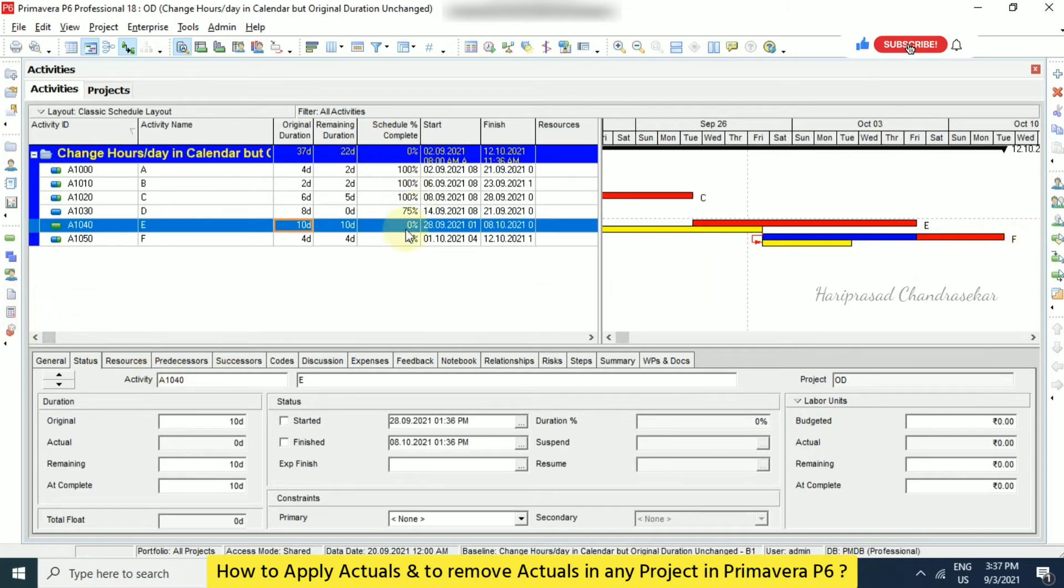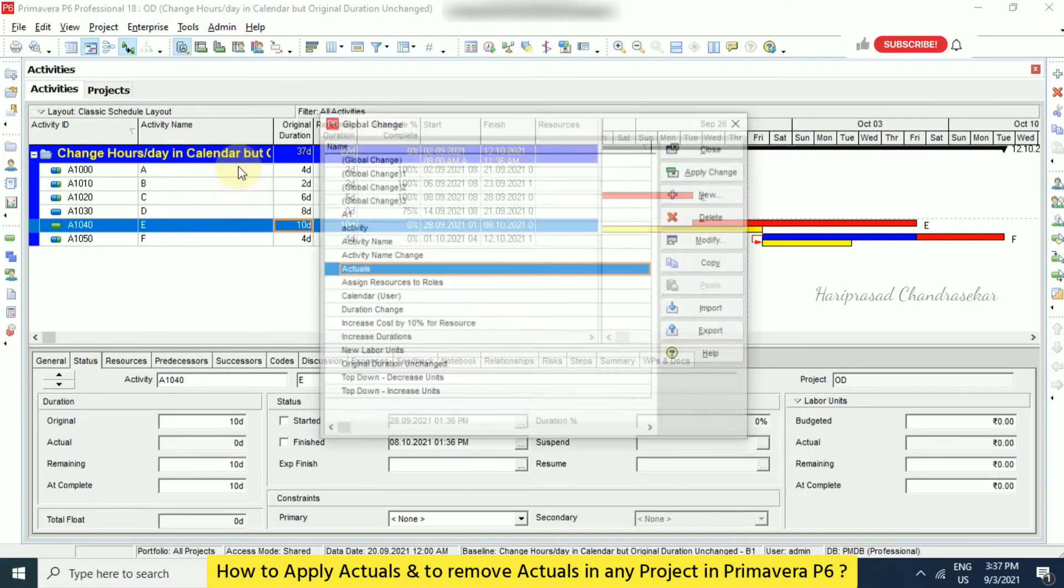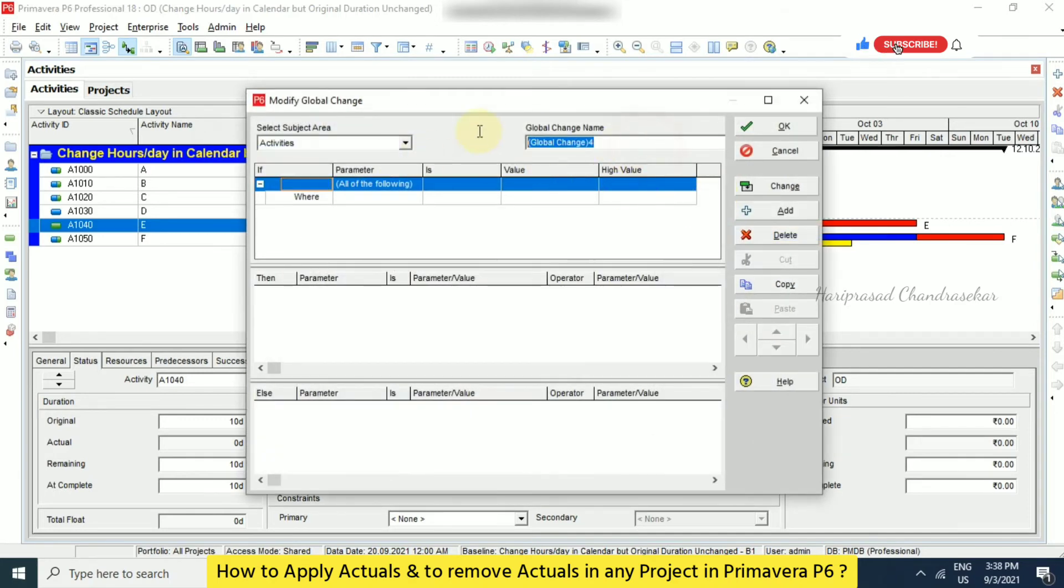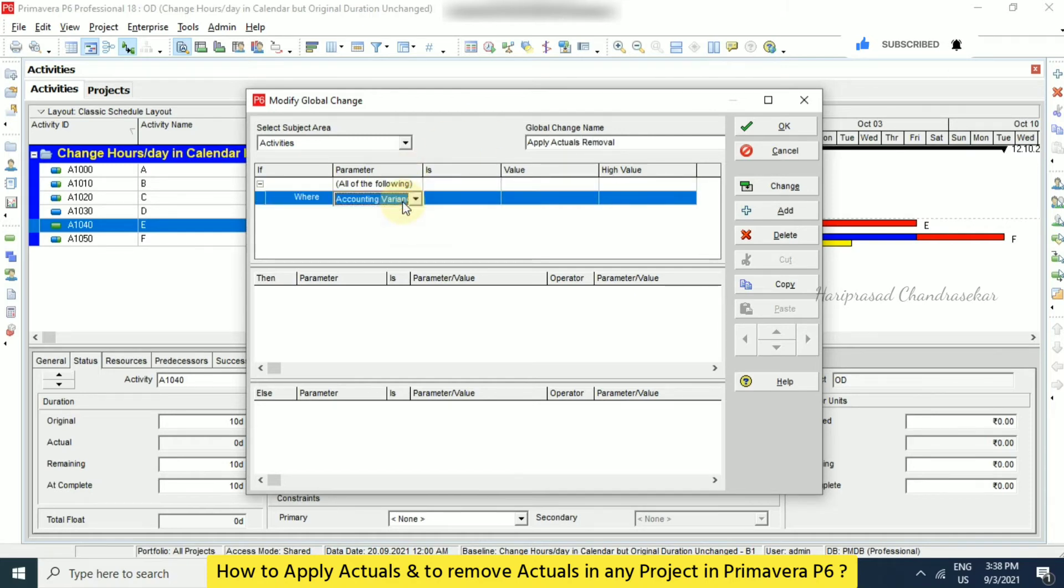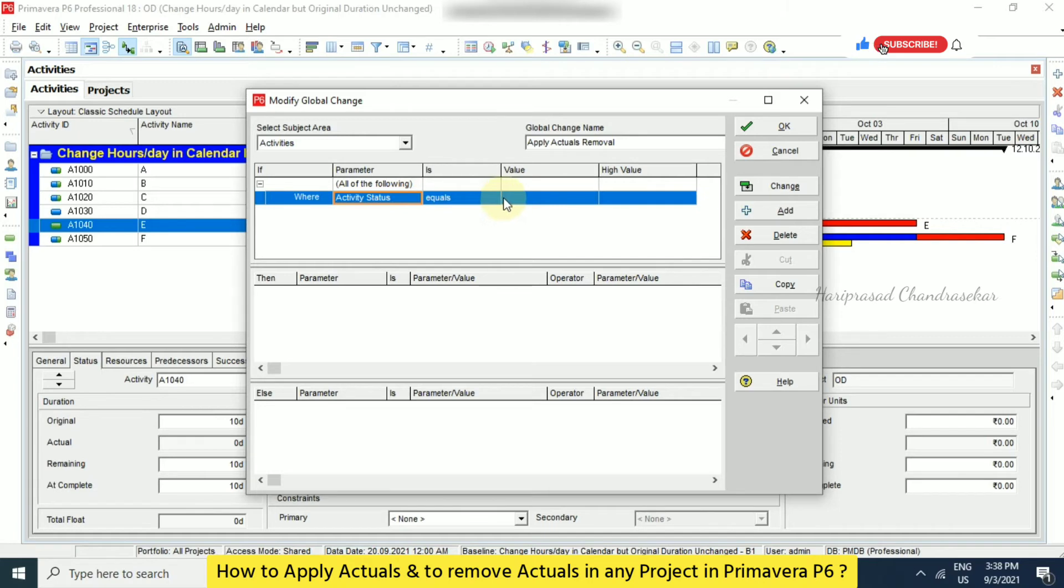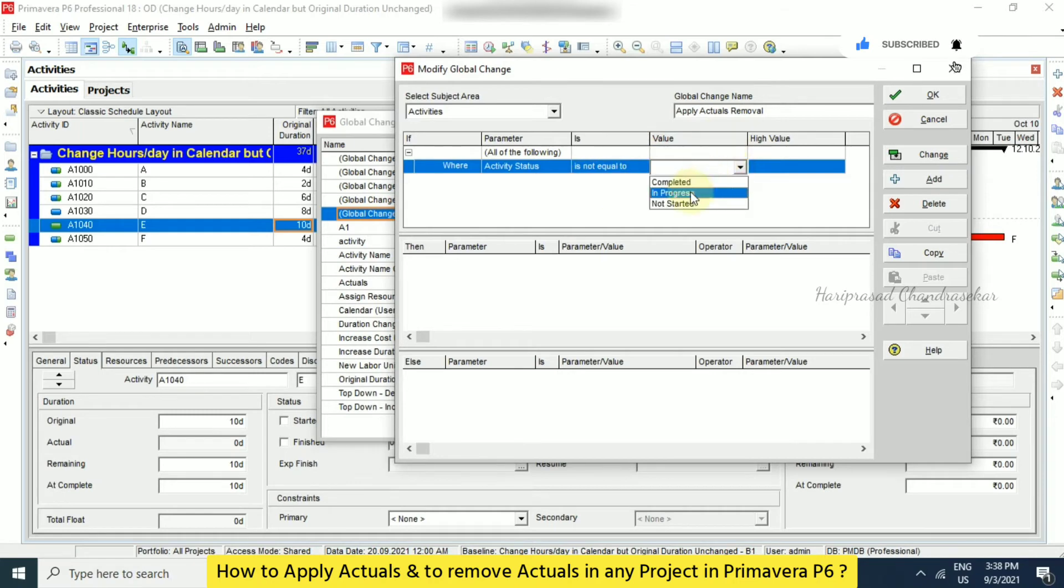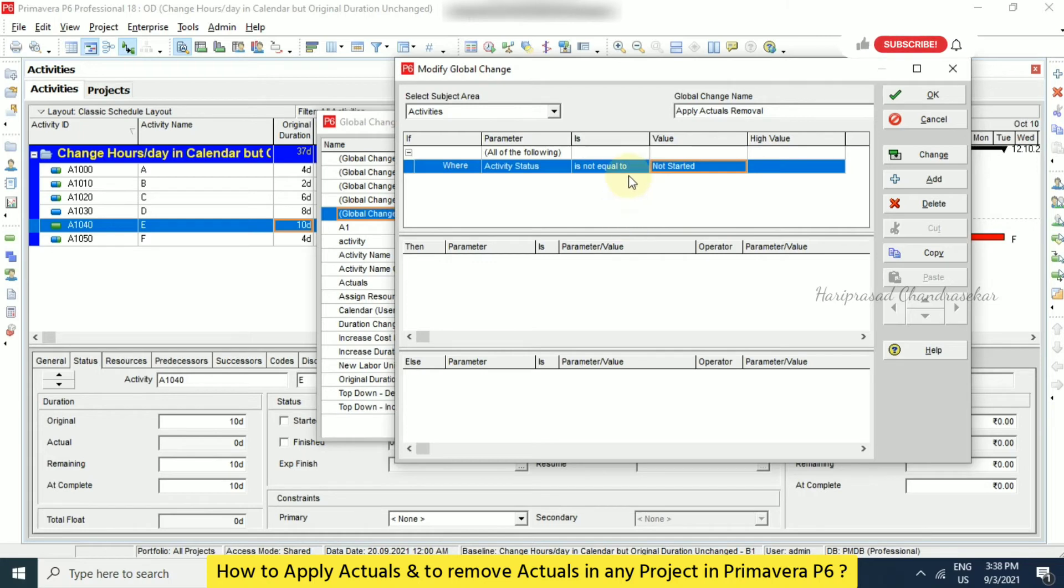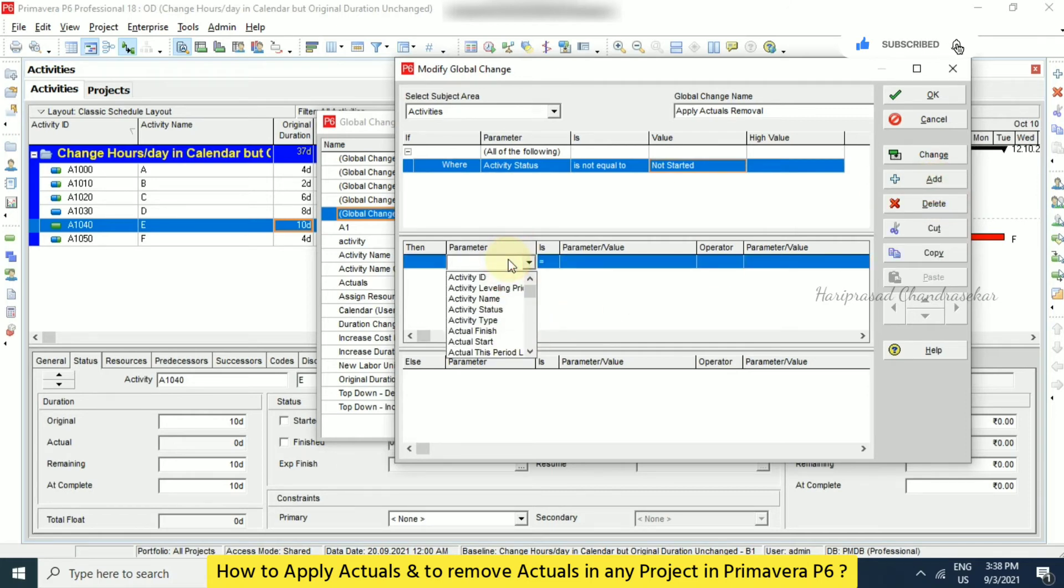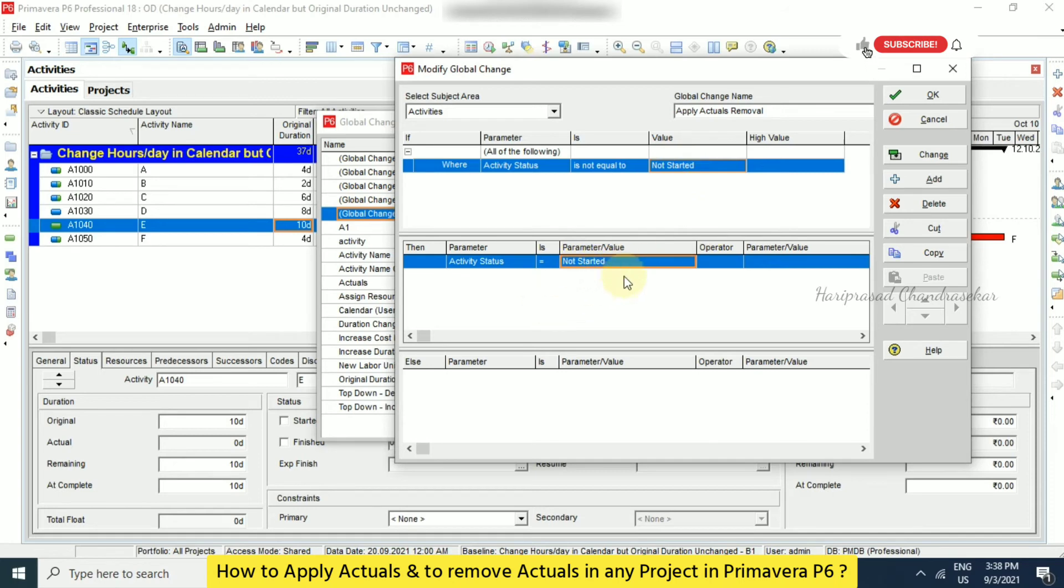In later, if you want to remove all this, what we can do? How to remove the applied actuals? So we can just go to tools and then global change. And here I'm just going to create a new one in the name of apply actual removal. Where I'm just going for activity status, when activity status is not equal to not started. When it is like this, then what we can do? We can just add something here. In that we can just go for activity status again equal to not started. When it is not equal to not started, it will make those activities to not started. So click okay.